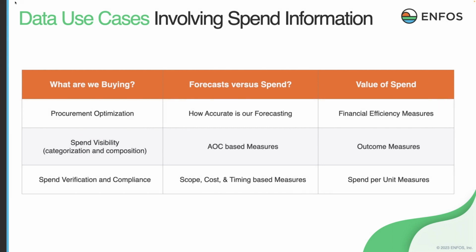Is it an ARO project? Is it an operating expense or non-reserve type project? That's categorization. Also, categorization is cost by phase of work and that work breakdown structure detail. Whereas composition is more based on the bottom level, level 4, that we talked about, that gets into your basic cost accounting elements like labor, equipment, material, subcontractors, utilities, and so on, right? That's composition of spend.